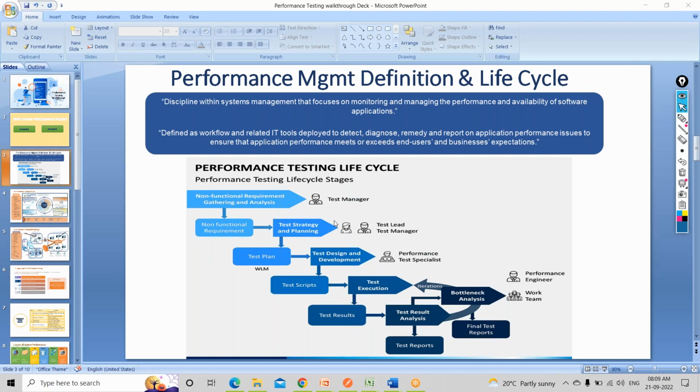Now once that is done, a SOW, a statement of work, is signed at that point of time. Because when everything is done and the things are not met according to the requirement, we can come back, and the client can come back. It is also used by the performance team, who can go back and say, sir, this is the initial agreement between us, and you are expecting more. Or the client says you are delivering less. So that is very important, and that's why it happens at this stage.